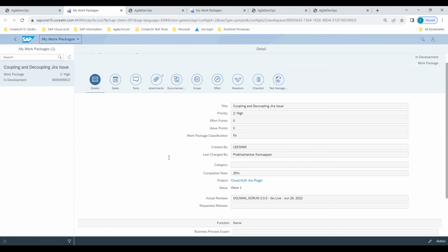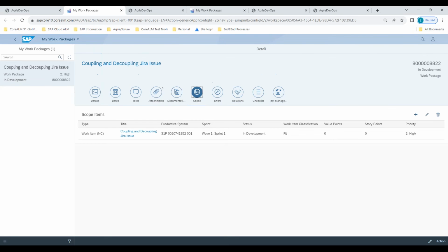If the requirement is the function, the work packages are a little bit too high of a level, and there are additional deliverables that need to be captured as well. So we would break down these work packages into work items. This is where you start thinking about which requirements will go in a certain release. As you get to a more granular level, you start thinking about, okay, my release will have 12 weeks. For example, we'll have 3 sprints.